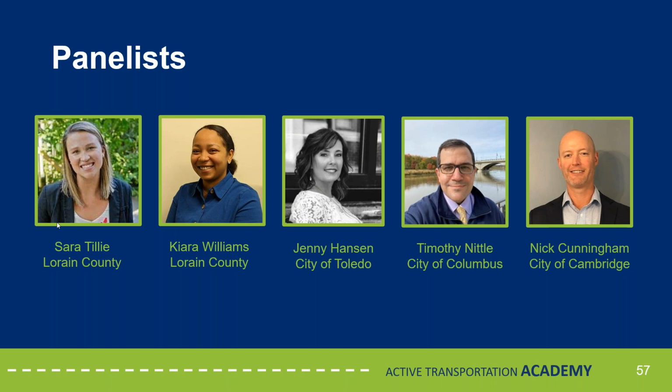So the TAP funding projects that we've applied for to date have all been associated with a larger project. If we were able to get funds through something like small city funds, those would fund the street, curb and gutter, some storm sewer, but they don't necessarily fund your sidewalks. So what we do is we try to couple those funding programs in order to maximize the funds that we can put towards a project. We've used TAP funds to date as part of a larger project. And then we try to utilize the Safe Routes to School or local funding to connect the dots between those larger projects.